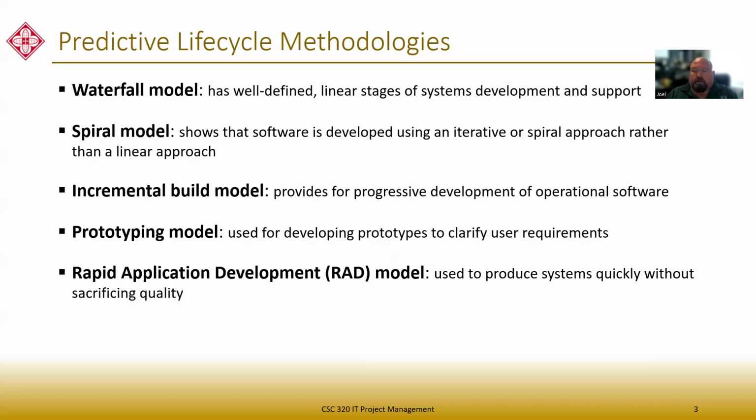So not what you would do with a predictive life cycle. Predictive means that I have a pretty good understanding of what the overall thing's going to be. My customer requirements aren't really going to change dramatically, and I have a good understanding. So boom, it makes sense to do something predictive.